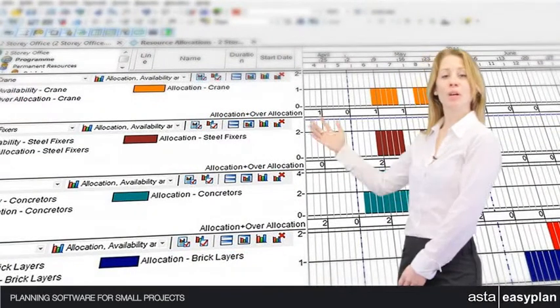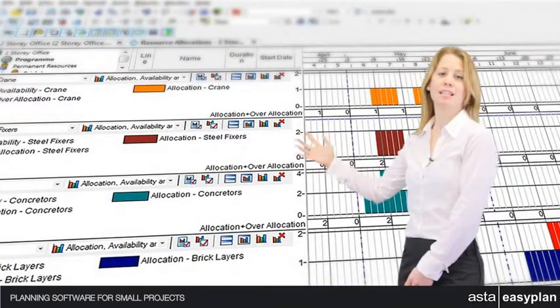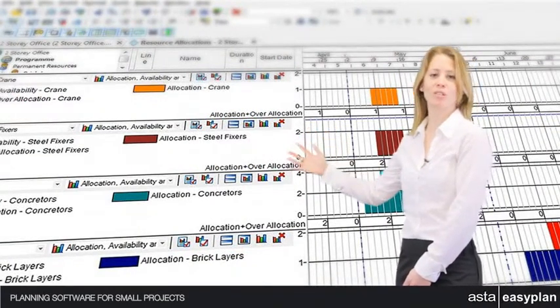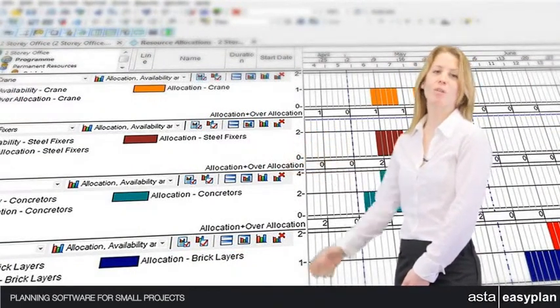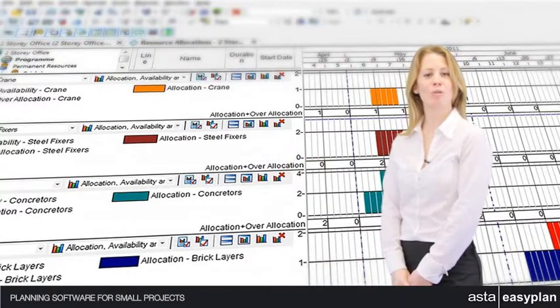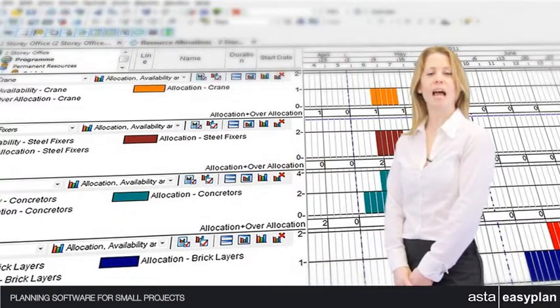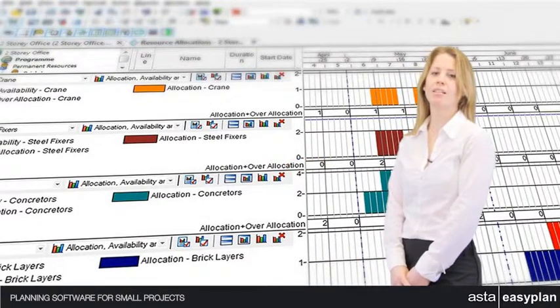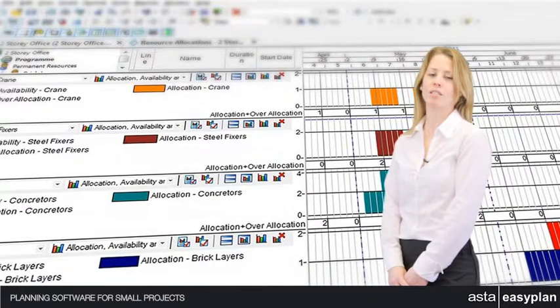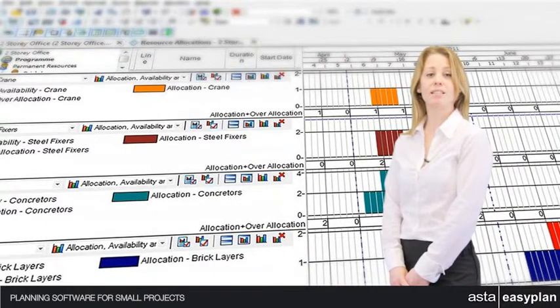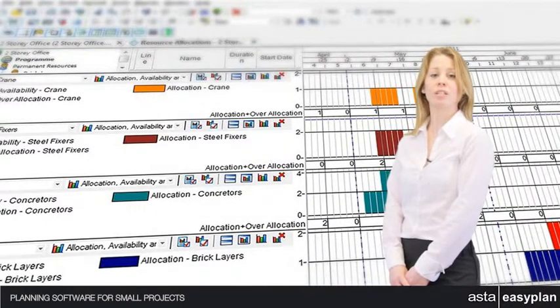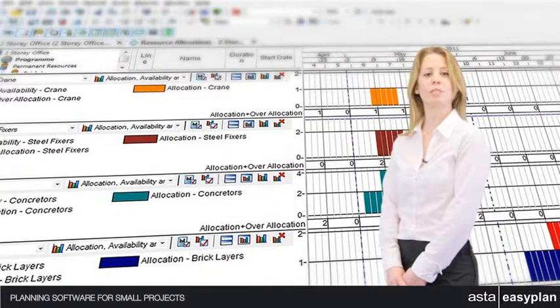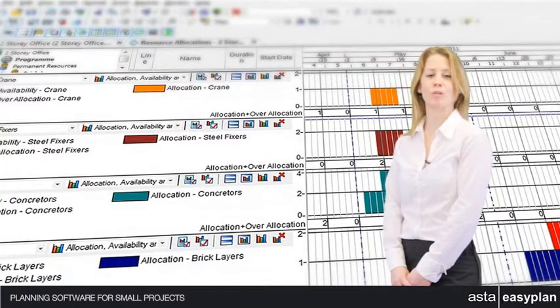The graphical histograms clearly illustrate all your resource demands and usage. Whether you are tracking people, materials or equipment, Asta EasyPlan's histograms highlight any over or under allocations. Necessary remedial action can then be taken before a project becomes delayed or cost overrun.